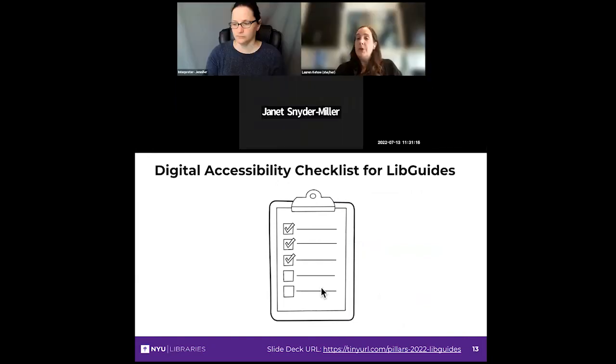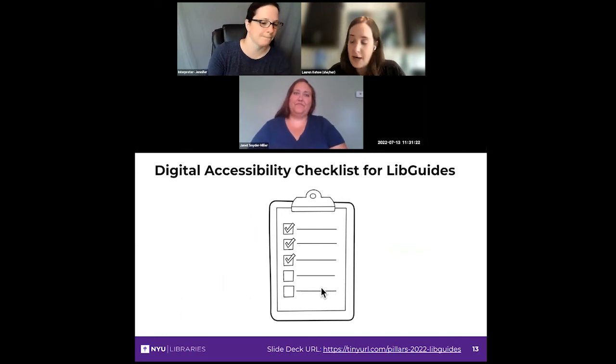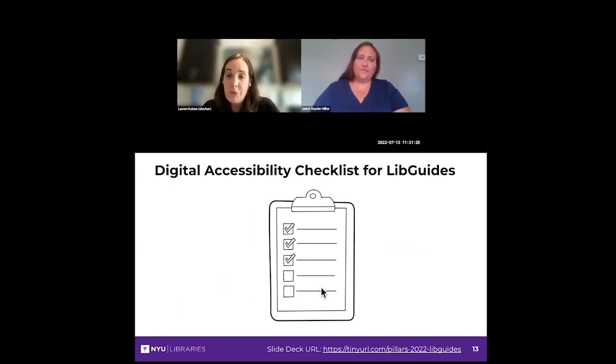Okay. I know we have a little bit more time to talk about what was actually done in the guide. And so I want to provide some milestones. I've mentioned the word milestones a bit now. We designed the project to include 14 milestones that content creators could achieve incrementally as they moved through the remediation. And so we gave content creators 3 months, from May 1st, 2020 to August 31st, 2020, to pace themselves and to apply these milestones across the guides that they managed.